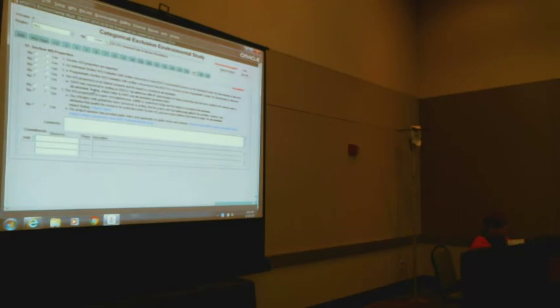Section 4F is also one that tends to confuse people, especially if you're not really familiar with it. On a CE, you could have all three of these kinds of impacts. You could have de minimis, individual, you could have a programmatic, and you could have a de minimis on a park. It just depends on your project. You just have to make sure you're answering them all correctly and that you have all the correct documentation. We don't do written concurrence from environmental services, but environmental services reviews and approves some of these 4F evaluations.